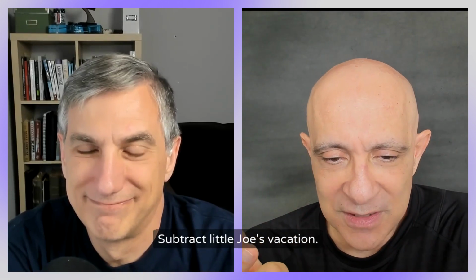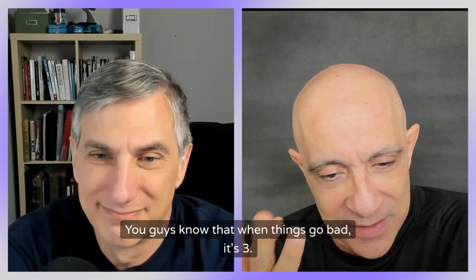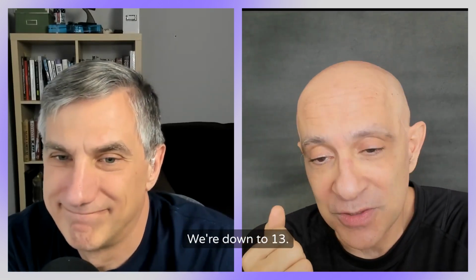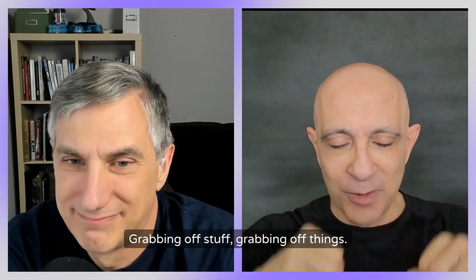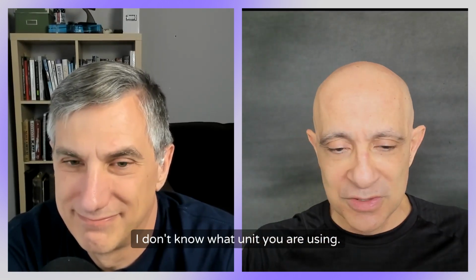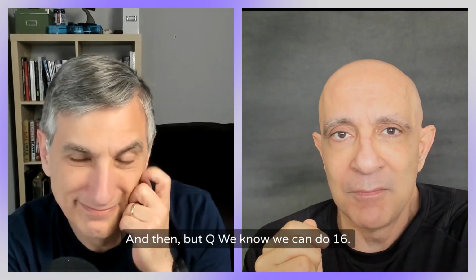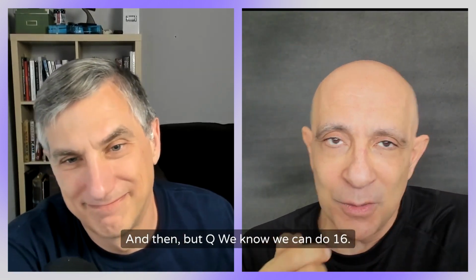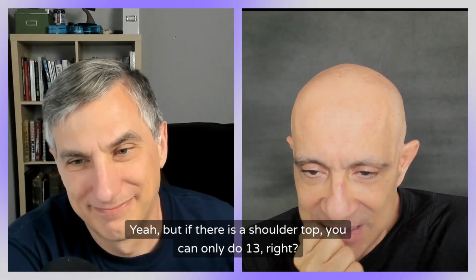So let's do this. Subtract Dave's vacation. Subtract little Joe's vacation. That's 16. You guys know that when things go bad, it's 3. We're down to 13. So what you guys do? Grab enough stuff, grab enough things. I don't know what unit you're using. I don't care. To make 13. "But Q, we know we can do 16." Yeah, but if there is a shoulder tap, you can only do 13, right?